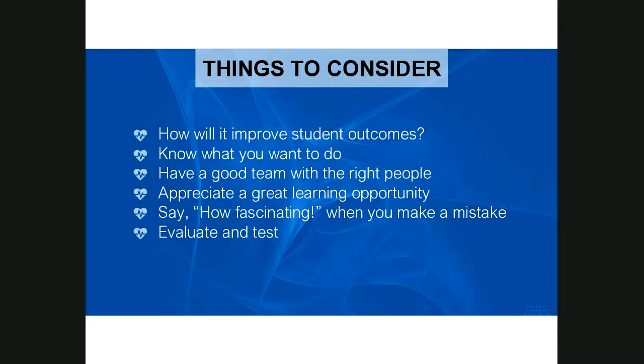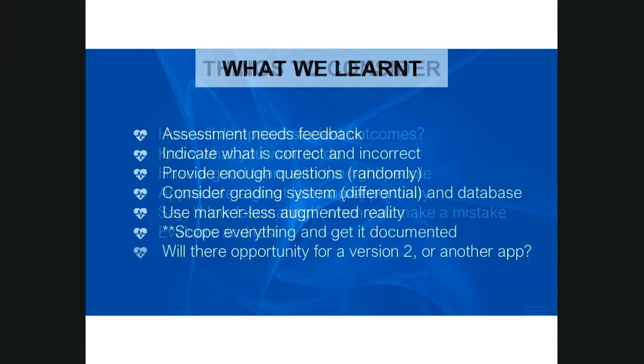Evaluating and testing took a long time. It was just as much time as building it. Often when you're doing a prototype, you can do the testing, and testing one thing breaks another. So we always had to thoroughly test all the way through. And that takes all of us. It's not just the project manager, but the subject matter experts are also taken away from their teaching and academic work to help do that. So we've learnt quite a bit through this.